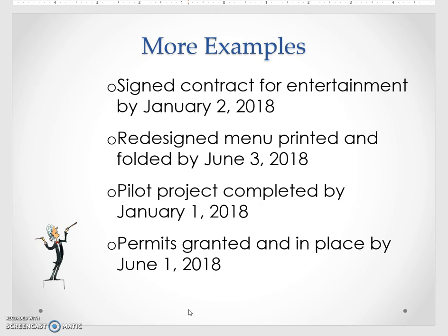So when we're looking at these milestones, show movement through your project in dates that are logical to when you think things can happen. You can mirror your deliverables somewhat, but definitely don't want to have items that we have to really make up to be done. So they should be very natural control points in your project.